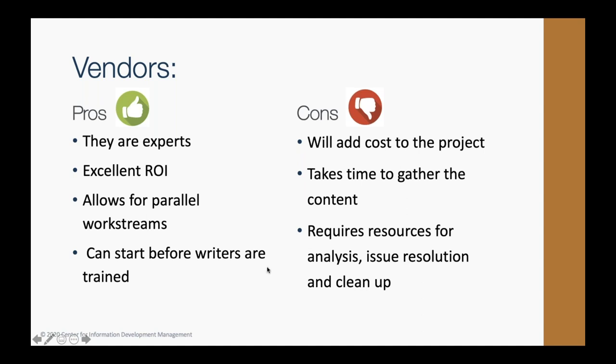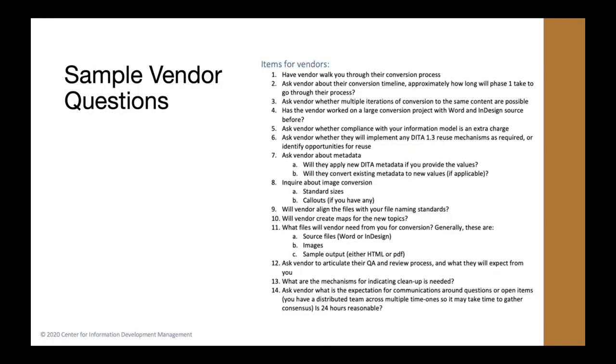And it will still require resources for analysis, issue resolution, and also cleanup, depending on the volume and the complexity of the content. So this is from my conversion checklist. These are some important questions to ask vendors that you are considering for converting your content. There's a lot of things about determining your service level agreement for communications. The vendor is going to want you to turn around any questions or emails that they send to you that require a decision as quickly as possible, because that's what slows down